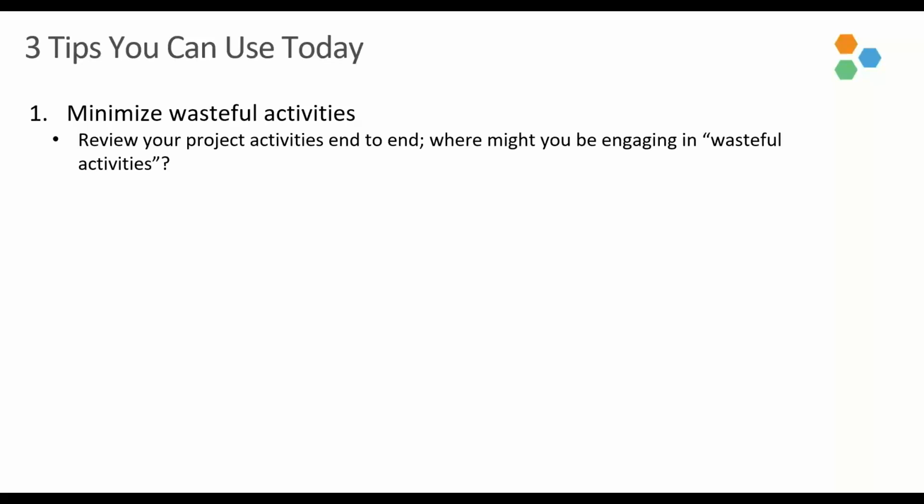So regardless of the development approach, whether it's agile, predictive, or hybrid, that you're currently implementing in your projects, there are beneficial practices that we can leverage from the agile mindset. Number one being minimize wasteful activities. And so the suggestion here is to review your project activities end to end, and ask yourself, where might I be engaging in wasteful activities? Just walk through that process.